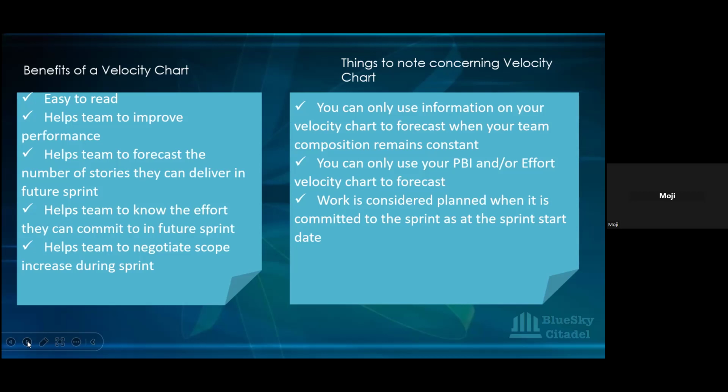So that is where the negotiation comes in. If we take this 13 in, first and foremost, does this 13 take priority over everything else in the sprint? If yes, it takes priority, so we need to do it. But if we're taking that in, then we need to take a 13 out so that we still remain within our average velocity, within the yardstick of what we can conveniently do during a sprint.